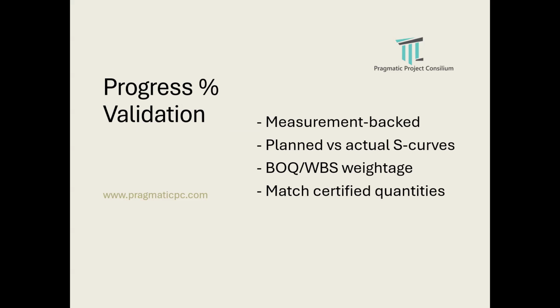For example, if it is procurement, if there is a certain percentage of achievement for you to release a purchase order, it will be updated. There is a milestone for your vendor placing orders to their sub-vendors, that will be progress measurement. So the project progress measurement will be in such a way.